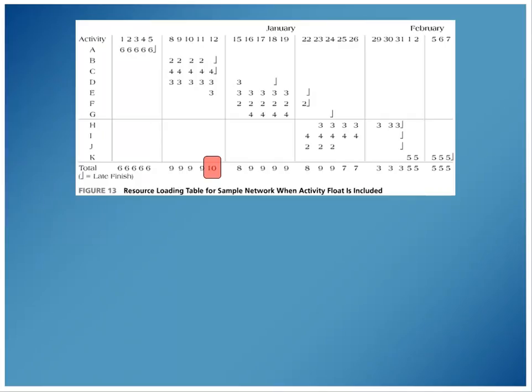D has a few days associated with it. I can move D over some, but even if I move it over those 2 days, which is my gap here on day D, I have day 16 and 17 and 18, 3 days, I'm sorry. I'm still going to have a conflict on day 12 if I move it over. Project activity E has 1 day available, and if I move it, that's actually going to free it there.